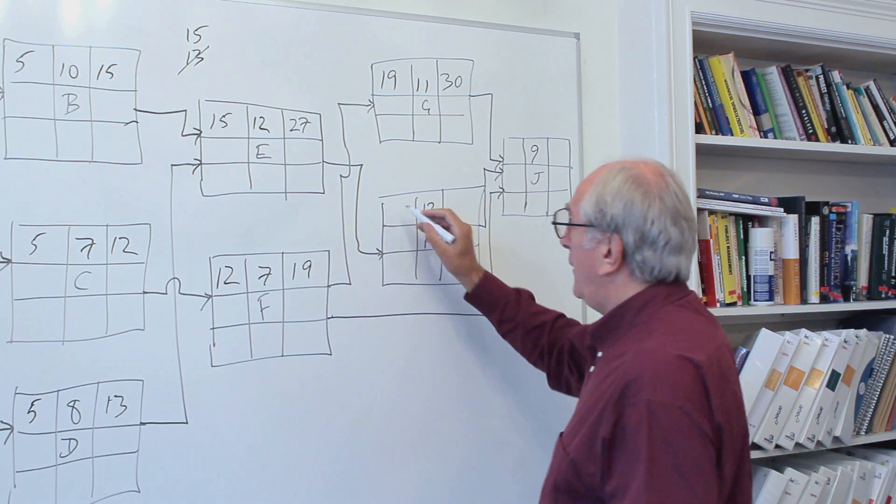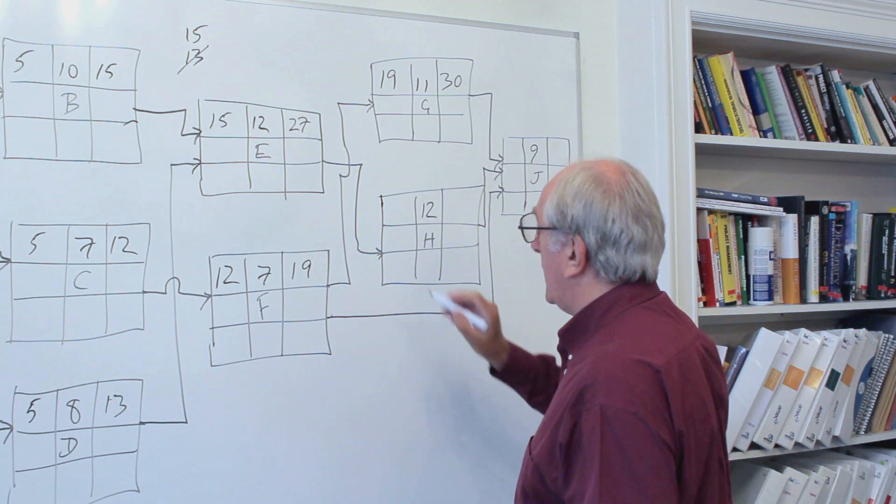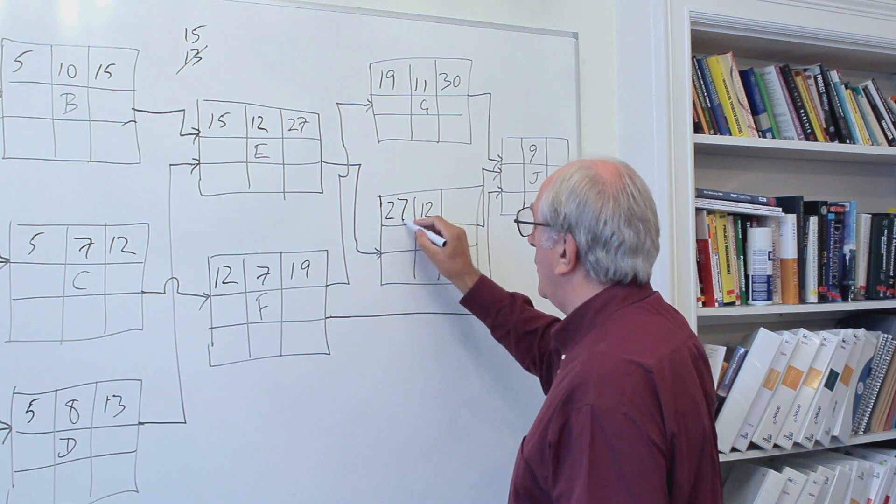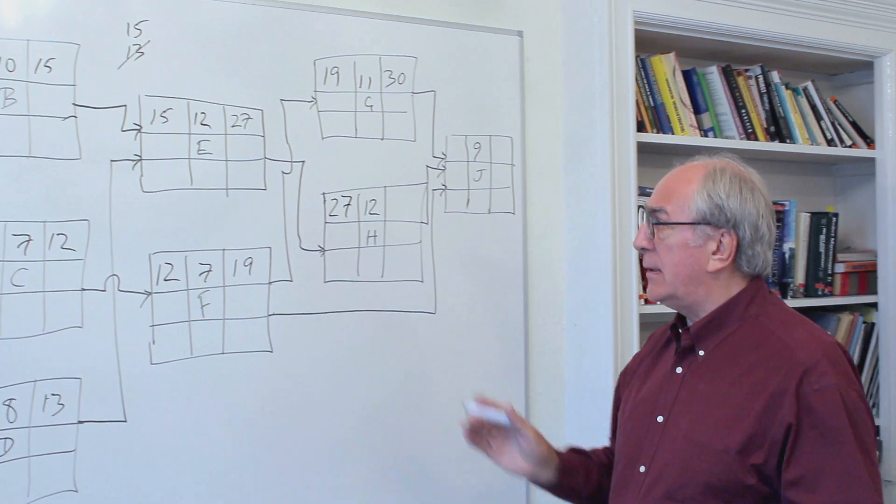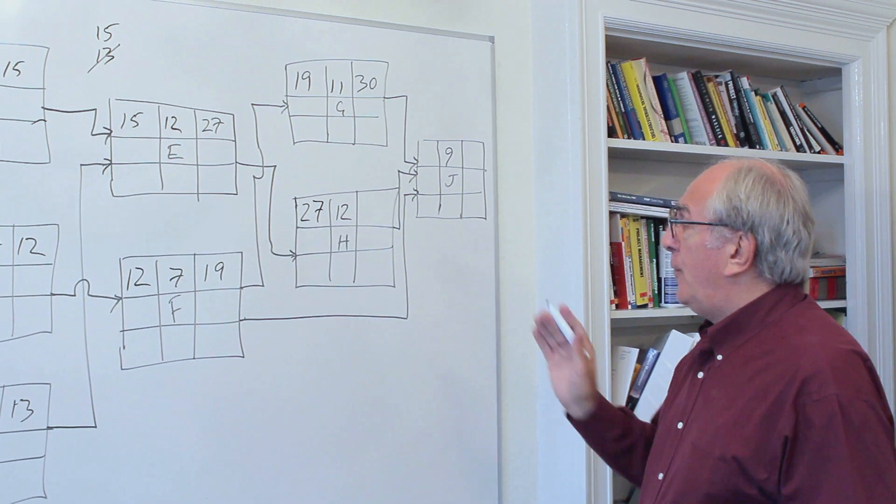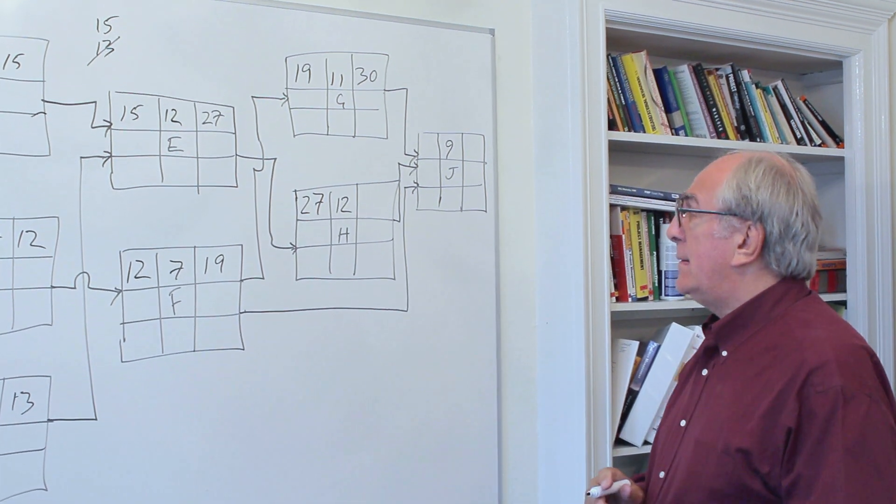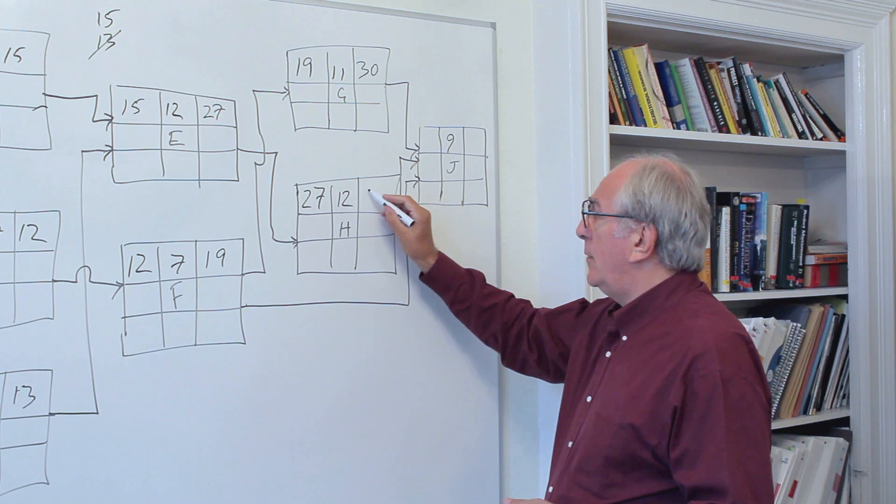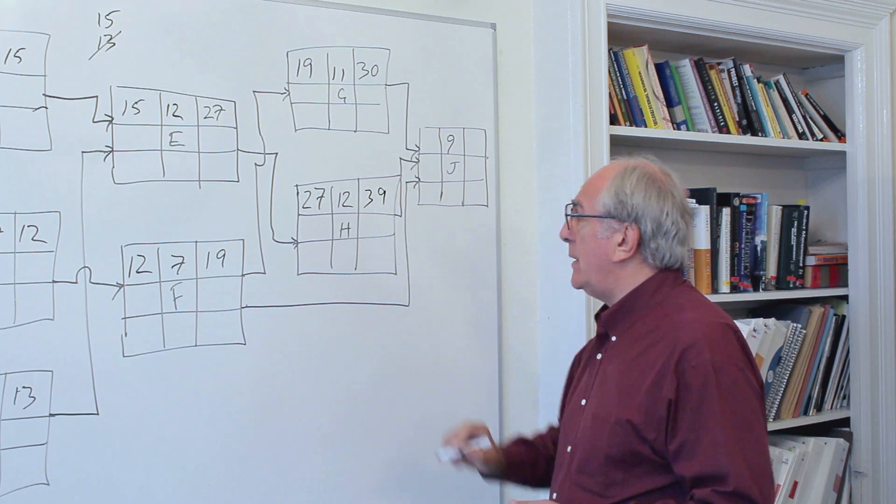If we look at E influencing or being a predecessor for activity H, then early finish of E is 27. That becomes the early start for H of 27, so 27 and 12 giving us an early finish of 39 for activity H.